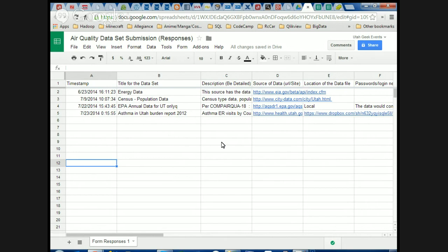So once the milestones are identified, they need to be put on a sort of a timeline. And that timeline has got to match the available time that the project has been entitled to. Having done that, it's time to get down to work and identify what actions are needed to cross each milestone. As you cross each milestone, it's a good idea to have a little bit of a celebration as well.